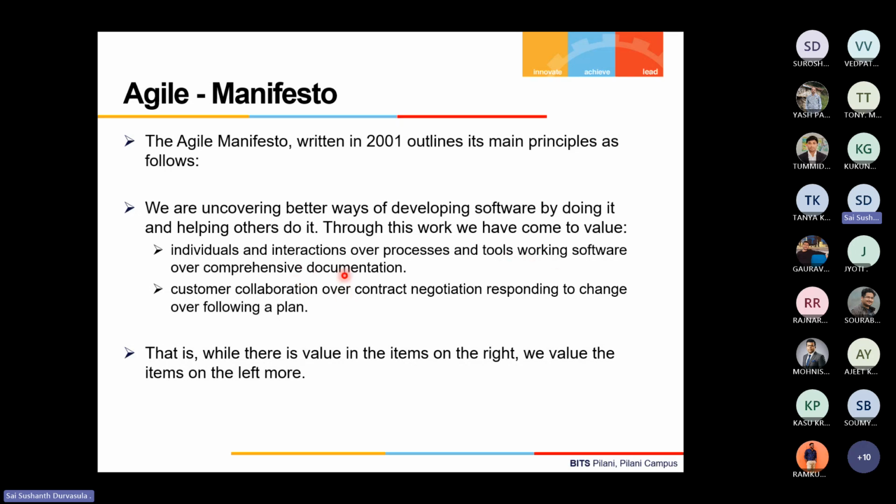So that is where we need to have daily meetings. Earlier, the meetings of the development team were monthly or even once in 2 months or so, when the model was like waterfall, where they had 6 months or 1 year of development. And that was fine there because there was comprehensive documentation. A lot of time was spent by the product managers to write the requirements clearly, by the designers to write the design clearly, and extensive documentation was there throughout.